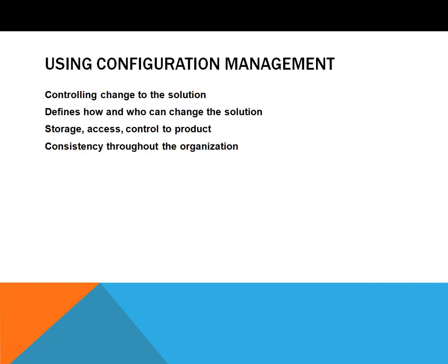You need configuration management. This is an approach to control changes to the solution you've identified, and it defines how and who can change the solution. It controls storage, access to that storage, and control to the product. And this is used throughout the entire organization, not just one project, so that it ensures consistency.